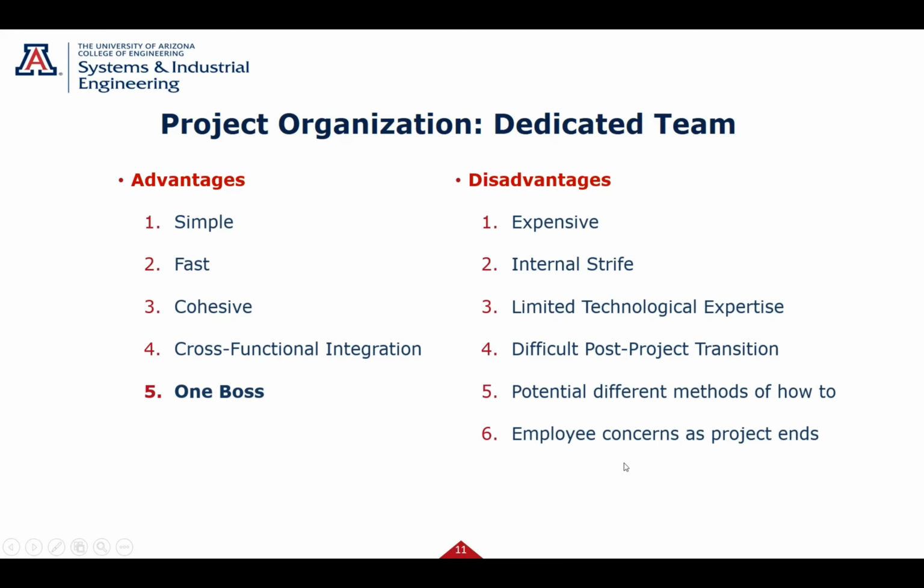What are the disadvantages? This can get expensive because now I have different project teams, and they all have an engineering team. In a way, I'm almost setting up a bunch of little companies in the big company. There might be some internal strife or competition across those organizations. I think you can manage this one.